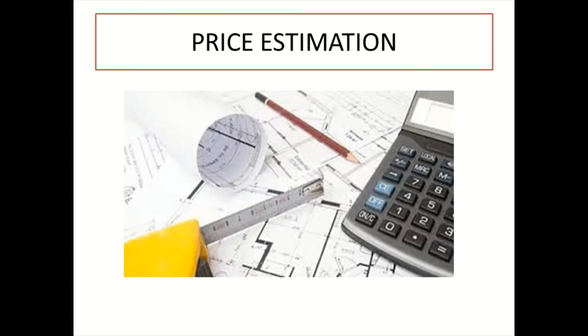Hey guys, welcome back to my channel. Please do not forget to like and subscribe. So in today's video, we are going to do a little bit of price estimation. Now just to give you a summary of the tender process: right after a quantity surveyor has finished compiling the bill of quantities and all the necessary tender documents have been finalized, the call for tenders is made to contractors.